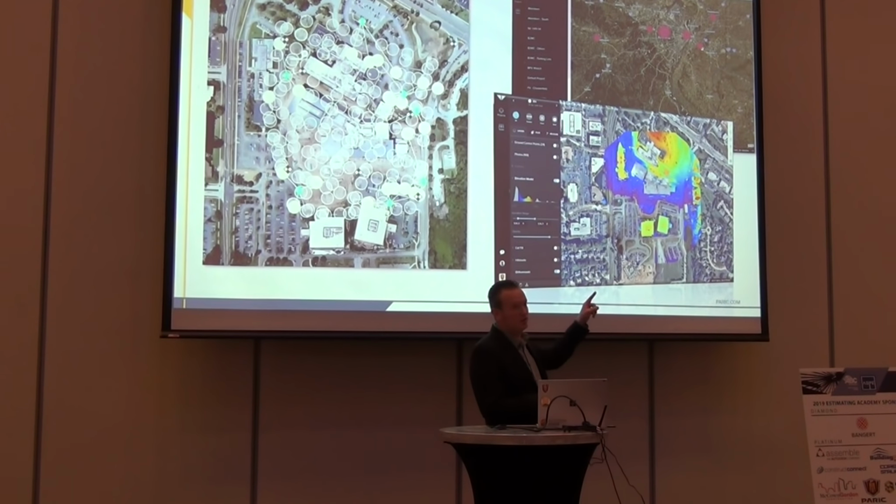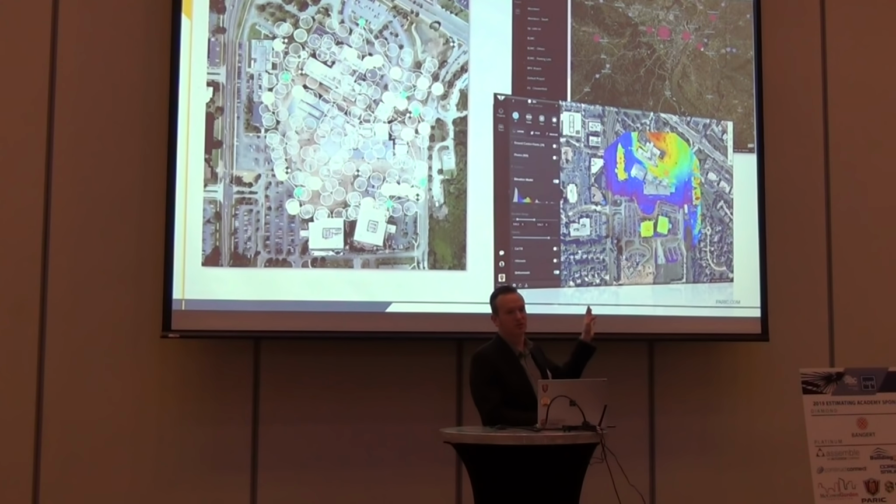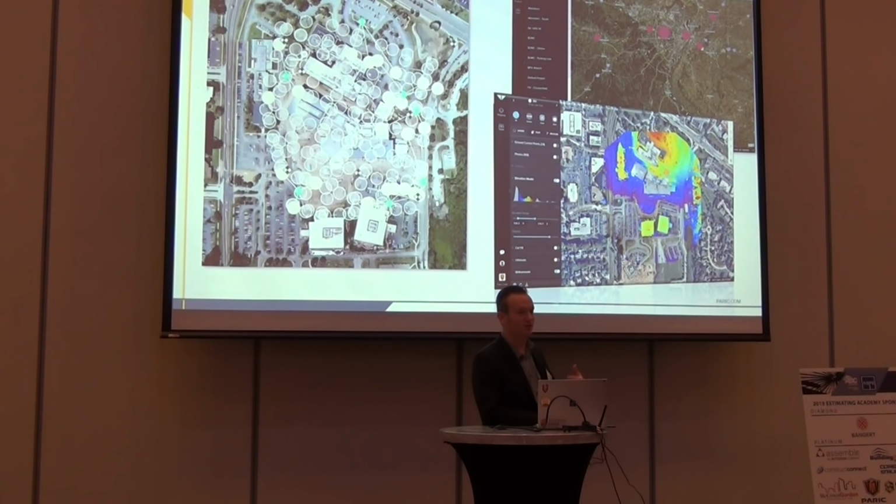We go week to week, and we can compare a scan and see how much earthwork has progressed on the job site. So now we can know, did they move 50 cubic yards or 5,000 cubic yards, or what kind of stuff has actually happened.